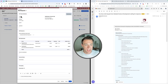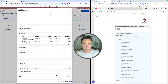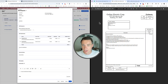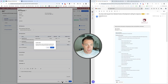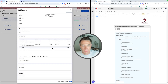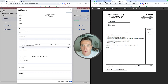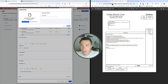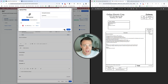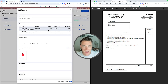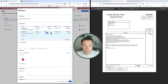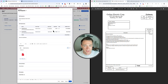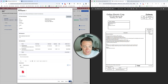If they send that estimate, I can go here and click 'Edit Bid.' Yes, I do want to edit the bid on behalf of the subcontractor — they're not in the system yet or don't want to use it. They've given me an estimate of $14,975, so I'm going to attach the document here. I can always upload the document so we can reference it. I'll put in the $14,975, and potentially add notes like 'does not include generator.' We can save that — it's now submitted. I haven't necessarily accepted it, but it's been recorded.